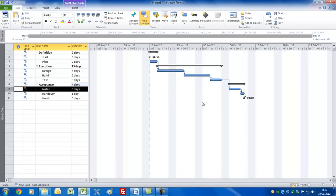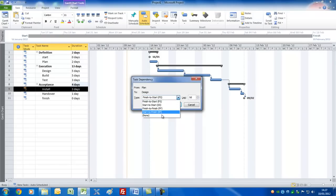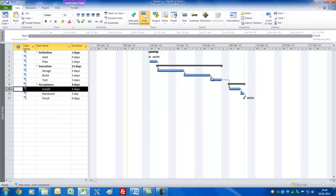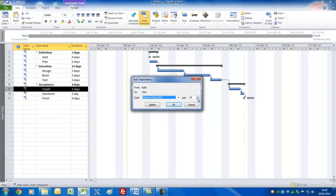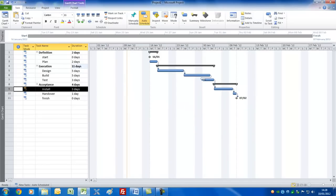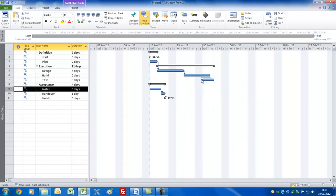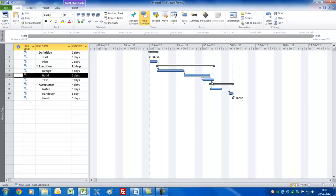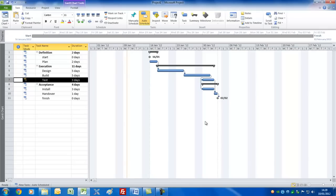Let's now link these together. I'll use the standard method of dragging from bar to bar through each task. I'm showing you this because I want you to get used to using this technique. If you overlay the mouse carefully on the link arrows and double-click, you can adjust the way in which they're connected and change them from different relationships. Between Build and Test, I'll double-click and put a lead in — a negative number — and you'll see it overlaps by that amount. Let's show how to delete a link: double-click again, press Delete, and that unlinks it. This time I'll put minus two days for that overlap.